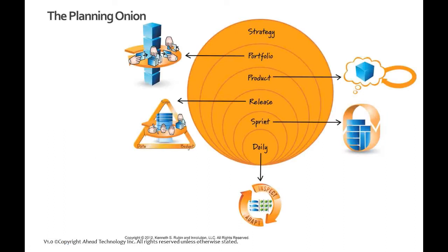So along the techniques as well, we talk very simply from this sprint level and the daily, so your sprint planning and your daily planning, or your daily stand-up. But when you look at a fuller picture, you're also going to be doing work before going into your sprints from a release planning perspective. So trying to figure out logistically how many sprints you're going to need to package into a release to actually go live. This is work done between the Scrum Master and the product owner.